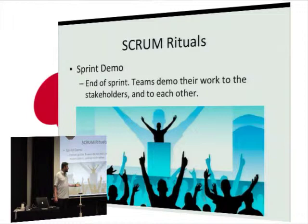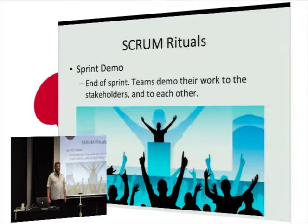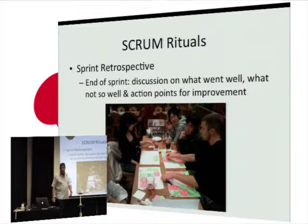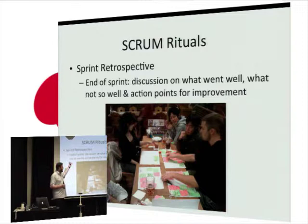The next ritual is the demo — another really important meeting, particularly in large organisations. All teams come together and show their work to business stakeholders, other teams, and anyone interested. The mantra in Scrum is 'invite the world to your demo' — even people not involved in the Scrum process or software engineering are welcome. Then there's the Sprint Retrospective, run by the Scrum Master internally per team, where you talk about what happened during the sprint, what you did right, what you did wrong, and whether things from the previous retrospective are working.